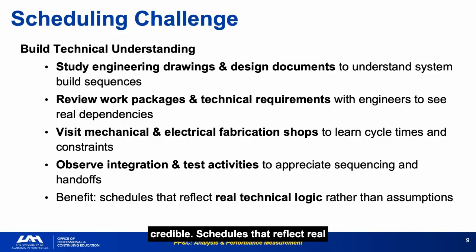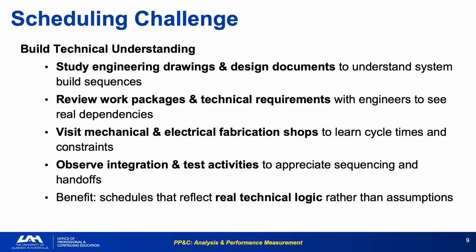Schedules that reflect real technical logic have fundamentally different characteristics from schedules built on assumptions. The durations are more variable, the dependencies are more specific, and the risk events are more visible. One afternoon in the fabrication shop is worth more for schedule understanding than a week of reviewing Primavera reports.